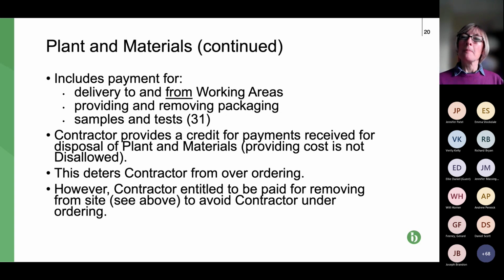And if you remember, it is specific, and that rule that if it's not covered in the schedule that you're using, the shorter schedule or the ordinary schedule, whichever's relevant, then it's deemed to be included within your fee. You need to be aware of what's covered so that if you have an unusual project, you potentially amend to cover anything that is an unusual cost.